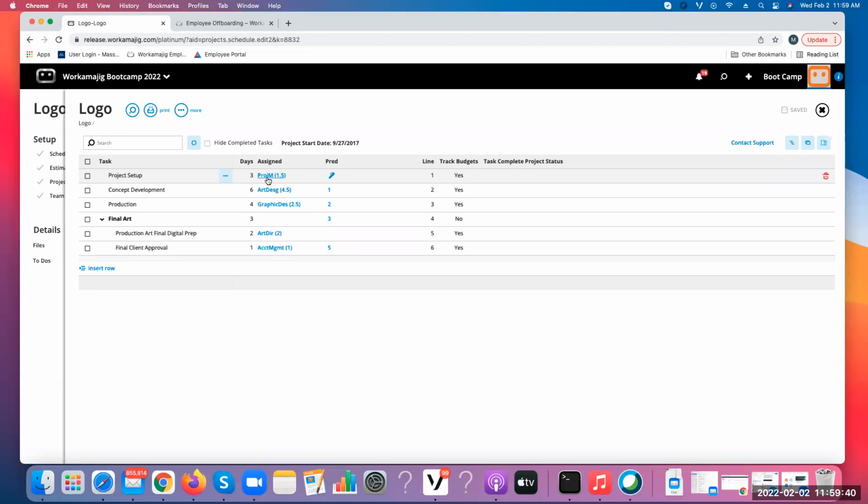Like we showed, if you want to build a team and push them out, you don't have to go into each individual task and put the person in. That's time consuming. But with that auto assign, you can just get them in there. And even if you auto assign and you have people assigned and that changes, well, that's no problem. Those changes can be handled in mass against many projects from the staff schedule.